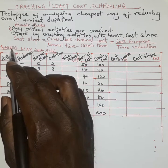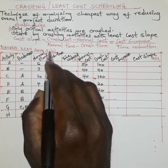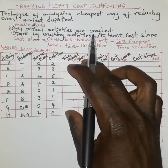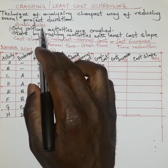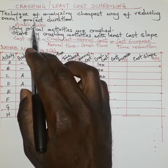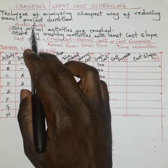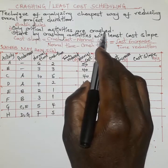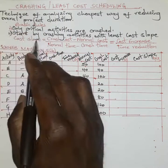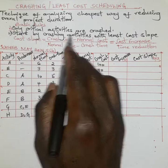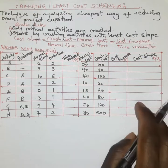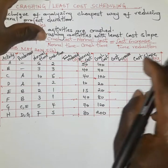Here we have an extract from a CASM past paper, May 2014, Question 5b. Before we examine this question, I want to recall two basic rules in crashing. Rule one: only critical activities are crashed. Rule two: you start by crashing activities with the least cost slope. This means we must first determine the cost slope.